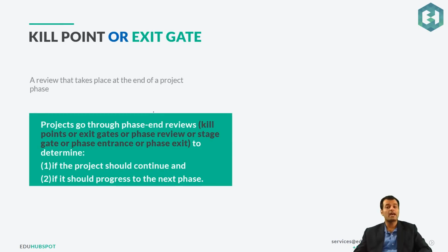Okay, so next we have the kill point or exit gate. A kill point or exit gate is a review which is taken care of at the end of each phase. Why do I do that? Because I really want to know if the project should continue or not. Is it really worth doing the Android app? Is it really worth doing the Apple app? We sometimes have to take those hard decisions that yes, it is not worth it.